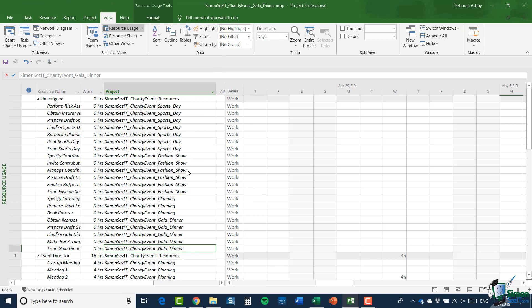Now, let's look at a very different situation. The gala dinner project manager has decided to work on the project at home and from home, he doesn't have access to the shared location. So, would the gala dinner project manager take the resource pool home? Well, in theory that is possible and provided everything were managed extremely carefully, it could even be made to work. But in my general experience, that is a bit of a recipe for disaster because once the gala dinner project manager has made whatever changes they were to make, including potentially changes to the resource pool, if they bring the resource pool back to the shared location on the following day and the other project managers have done the same, how do you manage to reconcile all of their changes with each other?